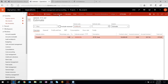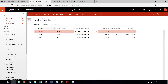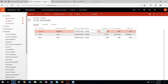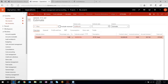Let's take a look at the cost estimate. Based on the cost of $375 against a total budget of $20,000 in cost, that's where it's coming up with that 1.88% complete. When you look at the cost estimate, it's saying we've recorded $375 in cost against a total budget of $20,000 — and that's how we're getting our 1.88%.